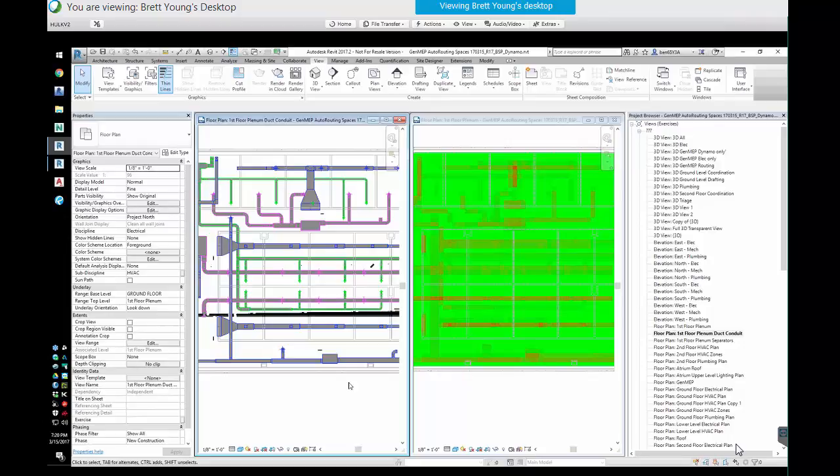A ramification of this type of thought is doing it the opposite. Build a topology of potential congestion ratios that you can use in early planning to know what are the areas you need to focus more. Yep. And so by having this nomenclature of potential congestion routes, then you don't have to wait for all the geometry to be placed to find that out. You know at DD that a complexity of 30% is a problem. It is not going to work in that corridor.